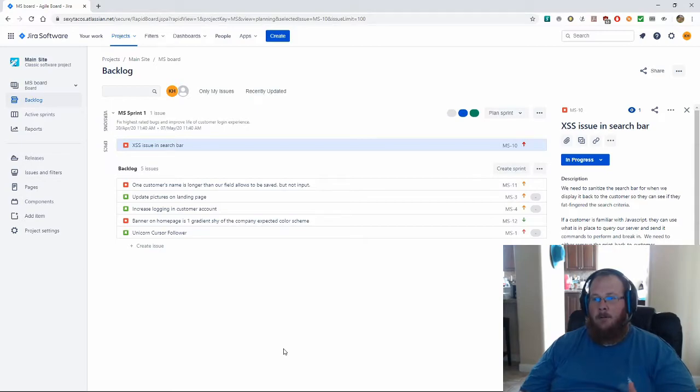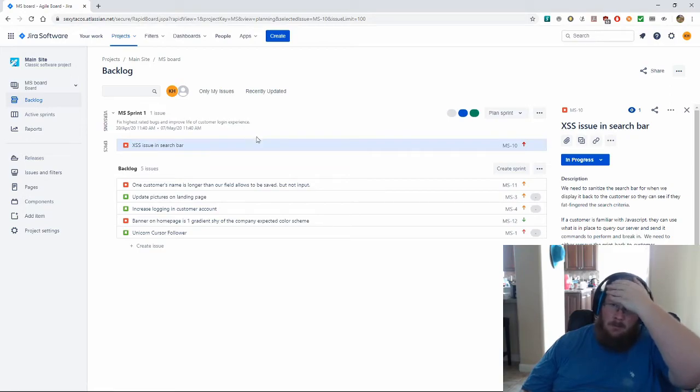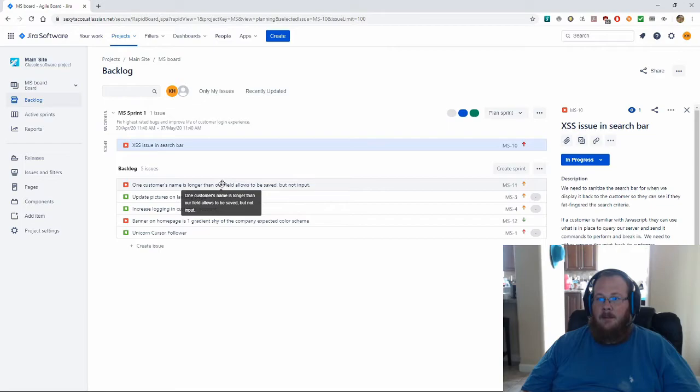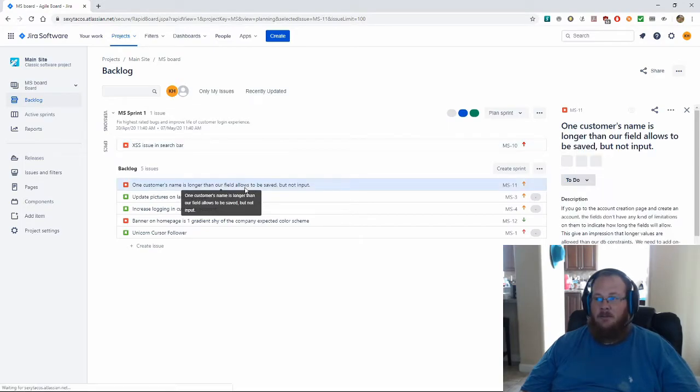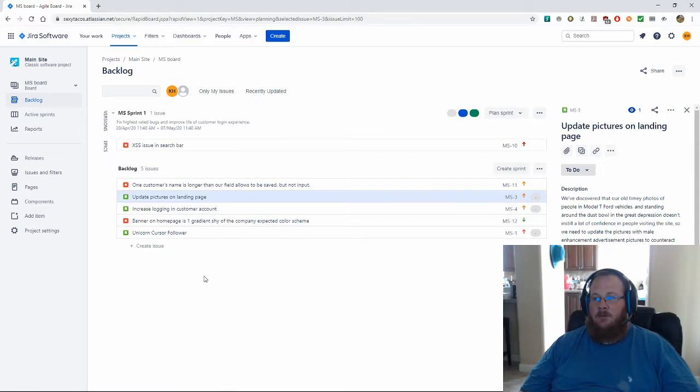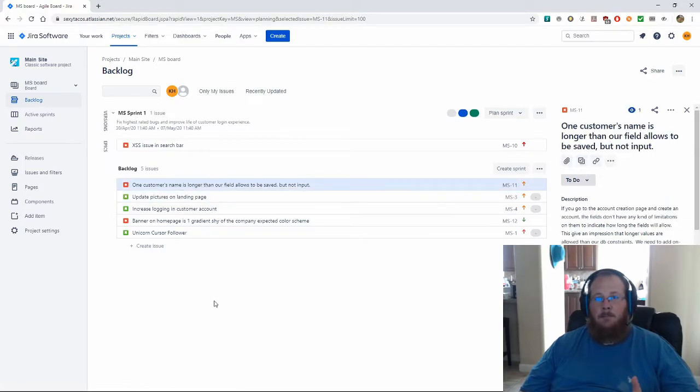And the project manager can come in and take a quick look and go, yeah, this is still the order, but the problem is that you assigned the amount of work to this issue as being a day and a half, and you put in the work for this issue about half a day. And so since we're past the middle of Thursday, if we give you this task, it's not going to get done by the time we have to deploy based off of your estimation.